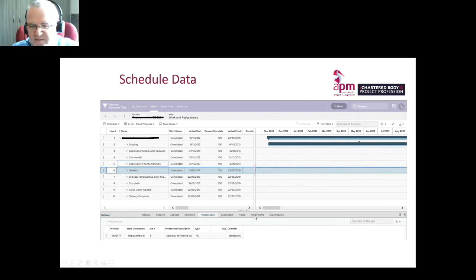And this was a massive benefit, because previous to having this system, what we found is because the task managers couldn't put detailed schedules in P6 because they didn't have the access, they used to use Microsoft Project or Excel, and what we ended up with was lots of Microsoft Project files scattered all over the shared drive. Okay, what this enabled us to do now is bring them all into one place.